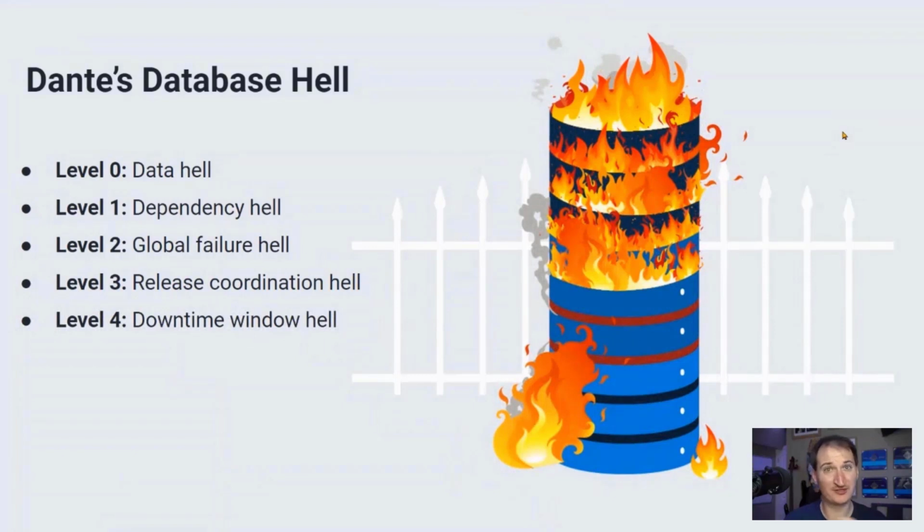Downtime windows are a whole problem, especially in tangled up big ball of mud systems, because nobody wants a downtime window. My users don't want it. Other parts of the business don't want it. When the database affects everything, that means everyone wants to stop you putting in a downtime window. Which means that in order to get your downtime window to perform this update, you need to negotiate with 150 people around the business. When you eventually get it, it's never for as long as you want, and it's always further in the future. And you've got stuff you need to get done, which means that you're going to pack as much stuff into it because these downtime windows don't come around very often, which exacerbates everything above.